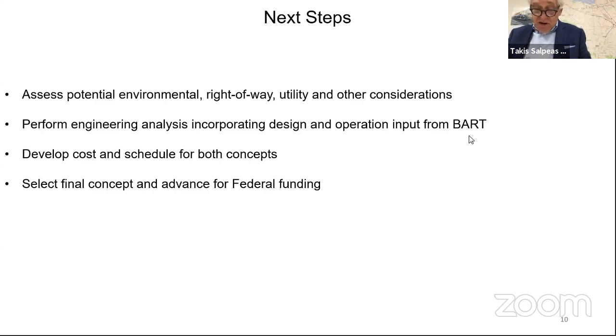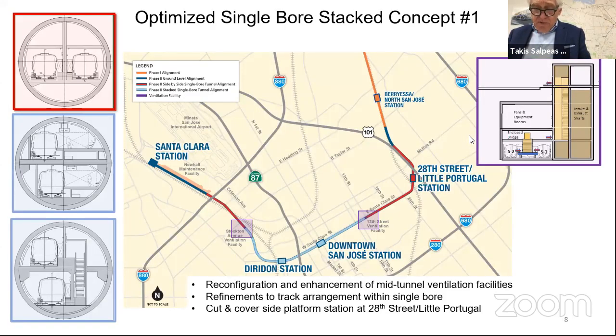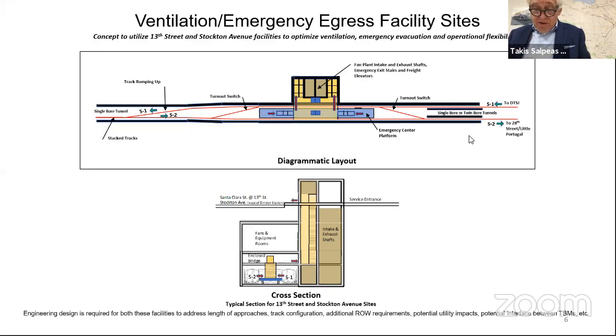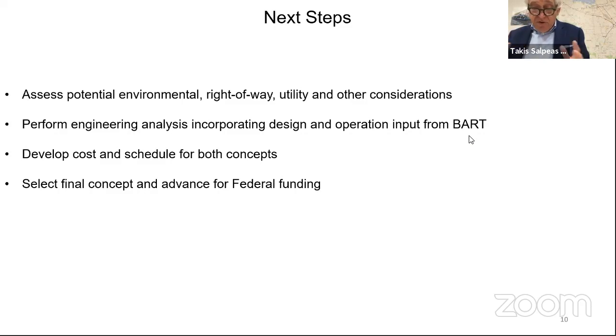It stays at the same level. Only the other track, S1, as you can see on page 6, goes through a ramp to go above the S2. Then we'd like to develop, like Nuria said, the cost and the schedule, which are very important to see where we are. Also, I would like to take the pulse of the contracting industry, assuming things will get more open and better as we're going on, and see how the contractors perceive our plan, our construction plan.